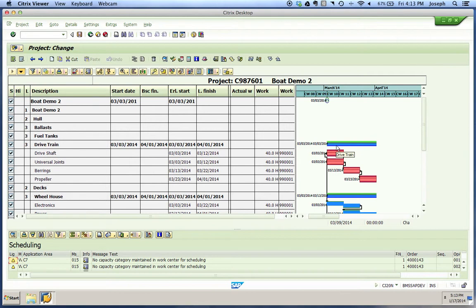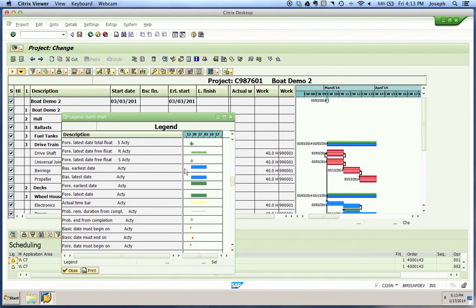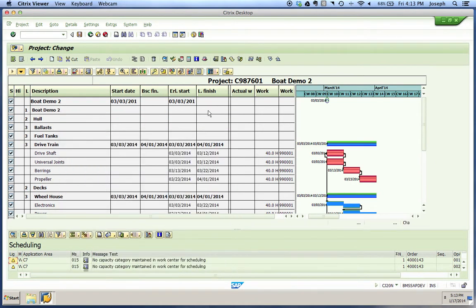If you'd like a definition of what the colors are, you can choose your Legend icon. That will bring up a screen that tells you what all the colors represent within the graphic. Going out of the project planning board and picking different WBS elements and their coinciding date tabs, you can observe all your forecasted dates and basic dates, just like we were on the opening screen.